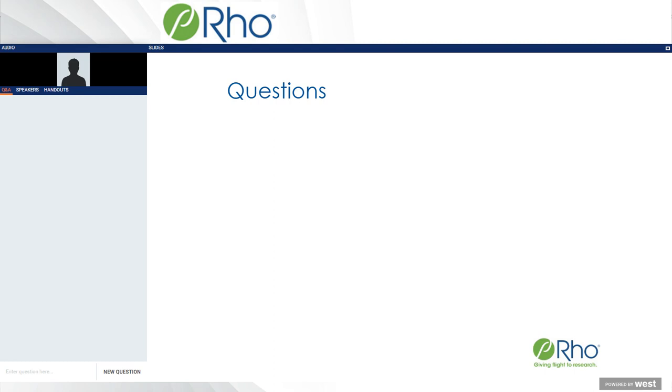So with these studies, they are fast-paced enrolling. There are times that you become surprised that it actually enrolls even faster than you thought. So some of the downstream effects with that are a lot of the things that we talked about trying to prevent from the beginning, with the SCV review and making sure that you're not having a backlog at the site. But something that you may not have considered is resourcing. So, if all of a sudden all of the items in your timeline are starting to now overlap directly, whereas you had them staggered, what you have to think about is there might be some resources that you had intended to also stagger, which now you need to supplement and add resources so that multiple activities can be going on all at the same time.